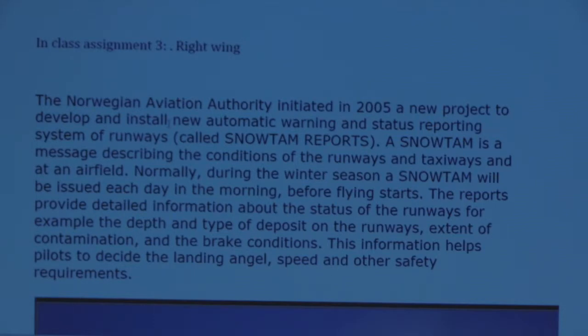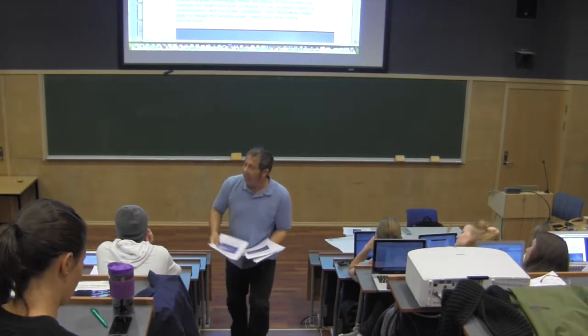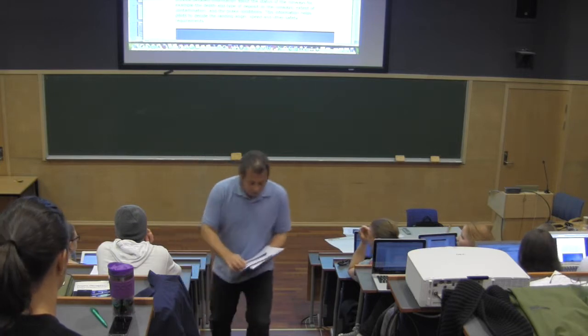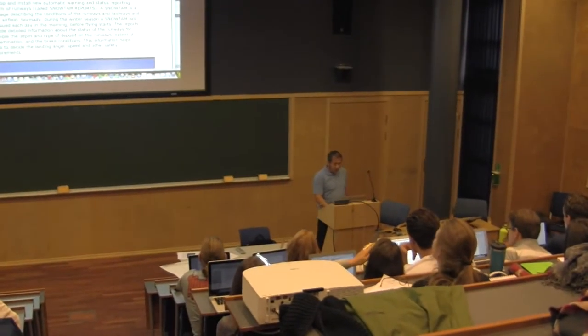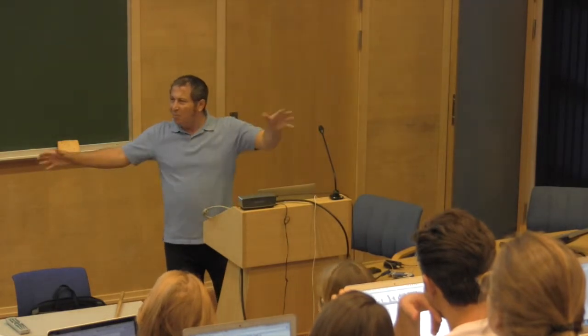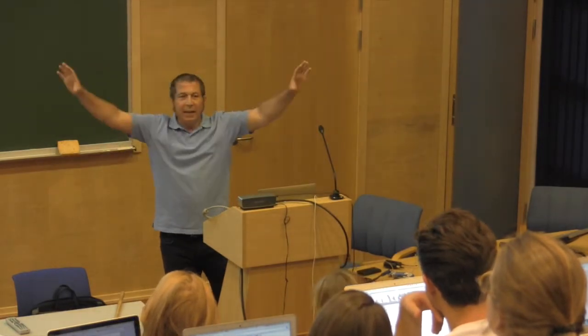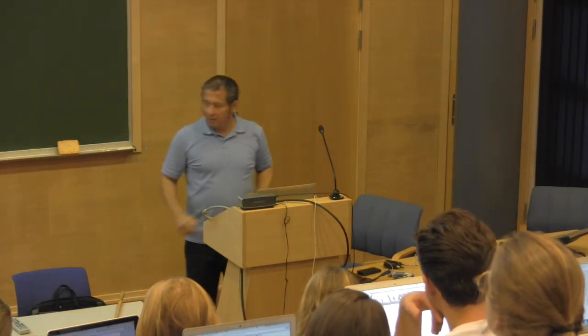And again, you will be working in groups. The assignment is online in the learning platform, but here Gerda was very kind to make copies for you. Just try to convert all these texts into a work breakdown structure. And by the way, just 3 levels will do. Don't make a lot of levels. Just the main deliverables and the work packages.